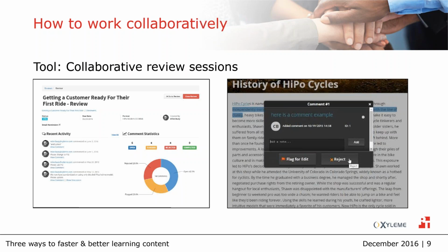So now you have all of your comments in a central place, and then you can manage those. We provide tools to help filter those comments, and then you can start to disposition them. So you can say, yes, accept these, we're going to do. Some things we always know we reject. Reject, I've heard, is maybe a harsh word for that, but those are the things like, nice idea, but we're not going to change it to purple, we're going to keep it blue, and then move on. And then you can also check those that are completed, so you can track your progress. The wonderful thing is that now you have an audit trail. So when a customer, internal customer, comes back later and says, oh, why'd you do this? You can pull up and see the chatter about the change and why that was made.